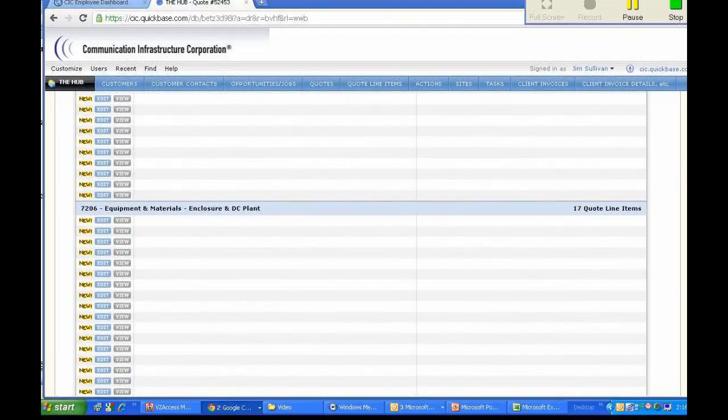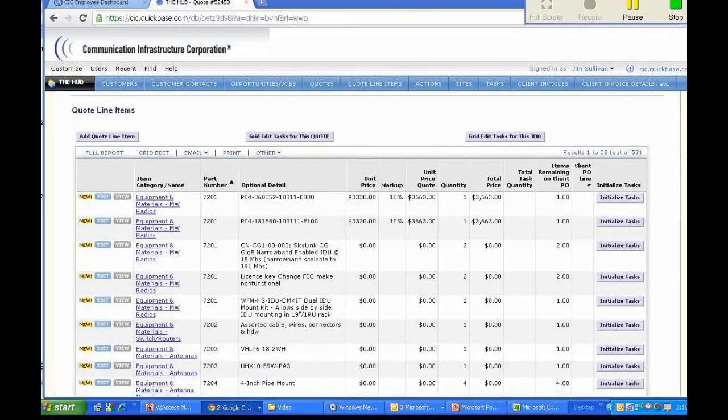And this makes sense just from a project management standpoint, because when changes occur, they occur by site. For instance, a rad height changes, so you need to change an antenna, but it's by site and perhaps the adjacent sites. So when you quote out a change order to the customer, it makes sense.